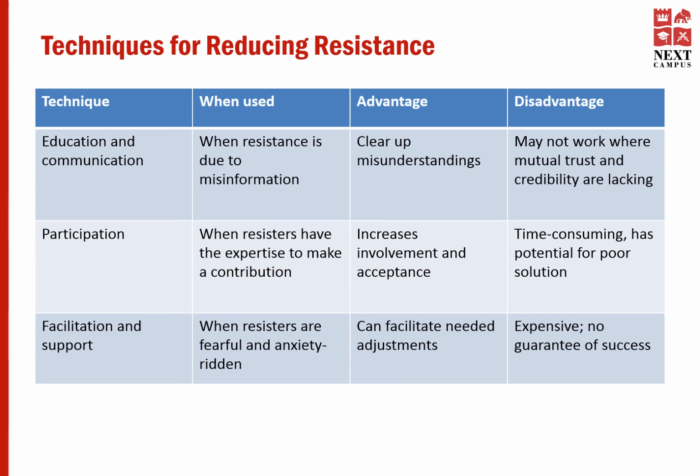The third technique is facilitation and support. You could use this when resistors are fearful and anxiety ridden. By using this, the advantage you gain is that it can facilitate needed adjustments. However, the challenge you face might be that this is mostly expensive. No guarantee of success.